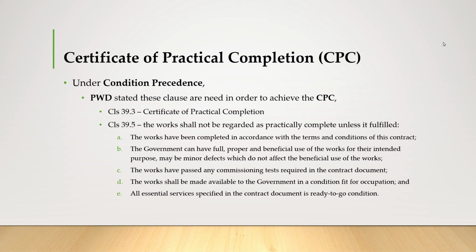There may be minor defects which do not affect the beneficial use of the works. The works have passed any commissioning test required in the contract document. The works shall be made available to the government in a condition fit for occupation, and all essential services specified in the contract document are in ready-to-go condition.